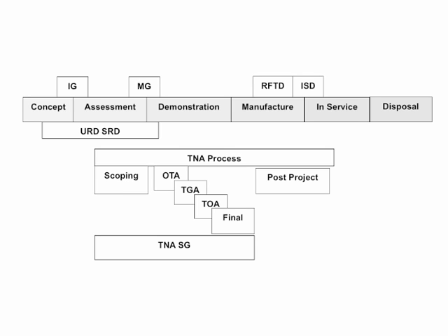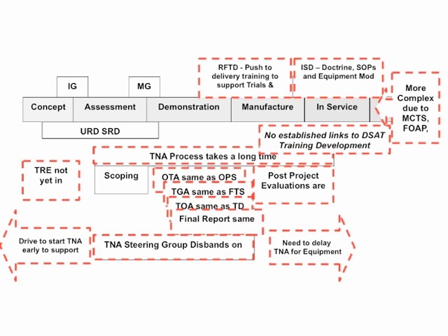Actually, when we look at that in the context of acquisition and the full CADMID process, we find there are a number of things wrong with it. Actually, the acquisition process starts much earlier than the TNA process, but in some cases, if you don't do the TNA late enough, you haven't got information available on the equipment you're trying to analyse. We often rush and try to produce training early and miss a ready for training date, and also we get the wrong training in for the in-service date. The current TNA process isn't bad, but the way that it's implemented isn't very good.